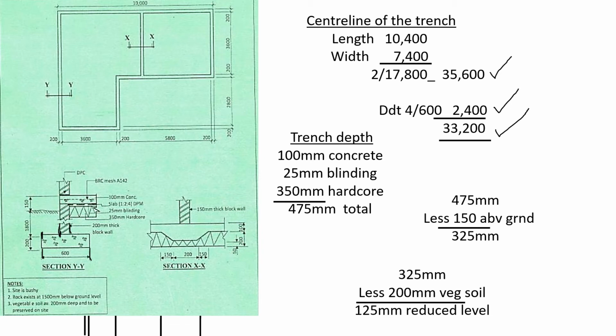Then remember in our previous video whereby I explained how to do center line, we said that center line for rectangles and center line for a rectangle with a recess at the corner, they are the same. That's why we are not going into so much detail. Center line for a rectangular plan and for a rectangular plan with a recess at the corner is the same. So we will assume it's just a rectangle, calculate the center line and use it.